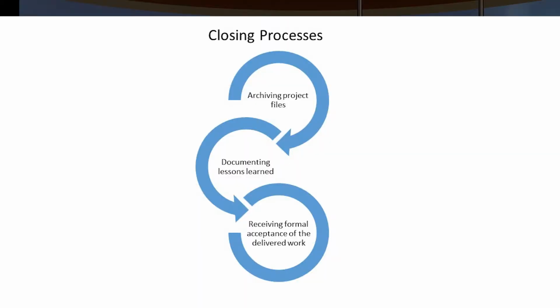Thank you, Orlando. After execution is completed, it is recommended that the stakeholder and customer acceptance of the project's products and services be done with a formal closing of the project. In preparation to close the project, all of the deliverables must be verified, and a final project report and presentation is usually provided. It is also important to include a transition plan to move the products and services provided into the production environment.